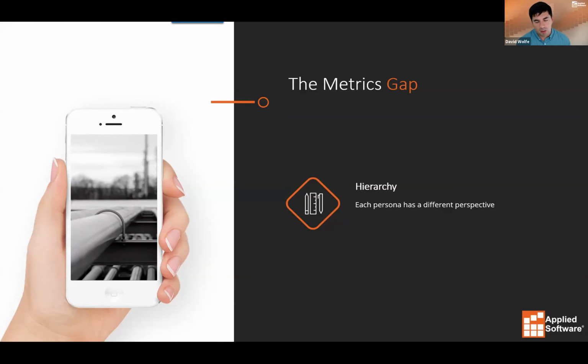And for estimation, like Owen mentioned, a lot of times the estimators have a big role in defining the schedule to some degree, because they bid the work. So do you compare your estimates to your final project and see whether you're on schedule, whether you're on budget, whether the stages that were defined were executed within the stages? And then at the designer level, we care about things like how many pieces of equipment we need to model, how many lines there are, or how many specs we're working with. Those are all things that affect the day-to-day work we're doing in the product in Plant 3D. So when we capture these things, and when you're starting to talk about what better plant design looks like, you're approaching it from the point of view of each role in the organization.